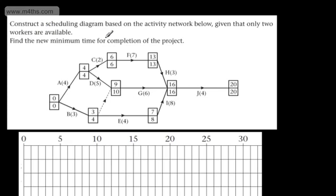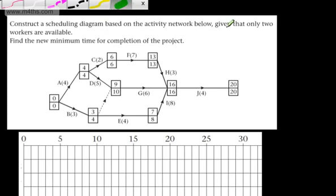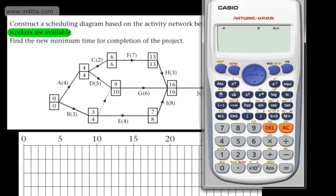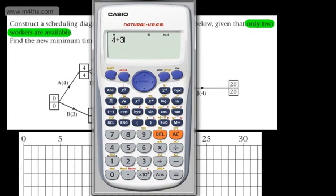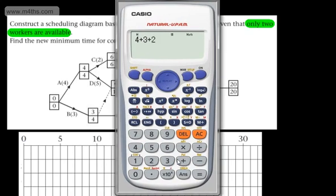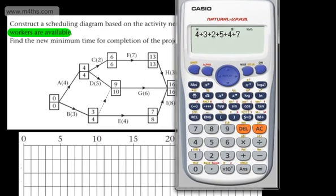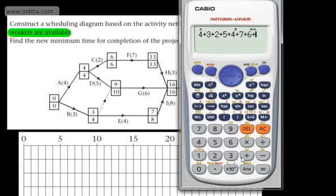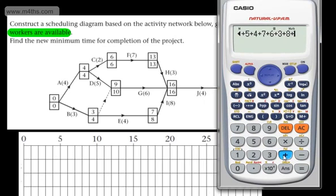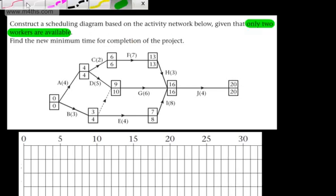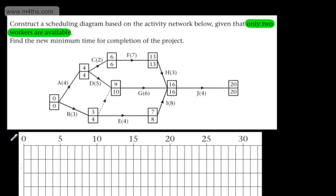We're asked to construct a scheduling diagram based on the activity network below, given that only 2 workers are available. We need to find the new minimum time for the completion of the project. Just out of interest, we could look at the lower bound. Adding up the weights on the arcs: 4 + 7 + 6 + 3 + 8 + 4 gives us 46. Dividing by the critical time of 20 gives 2.3, so we round up to 3. We would need at least 3 workers to complete this on time. What we're going to do is attempt it with 2.